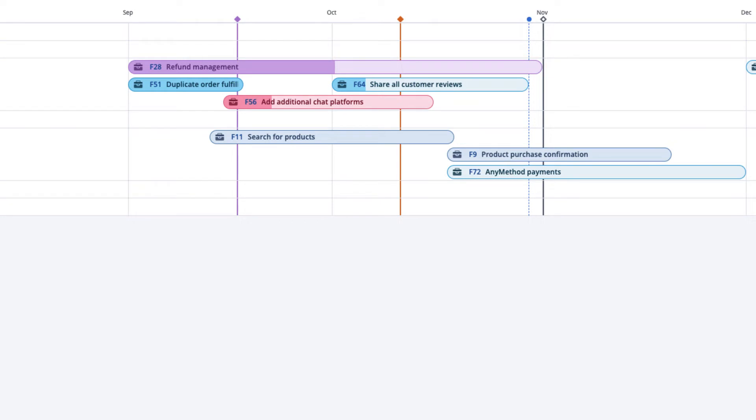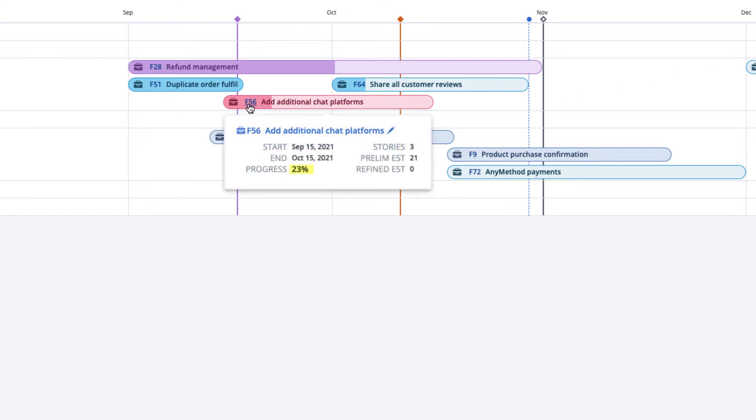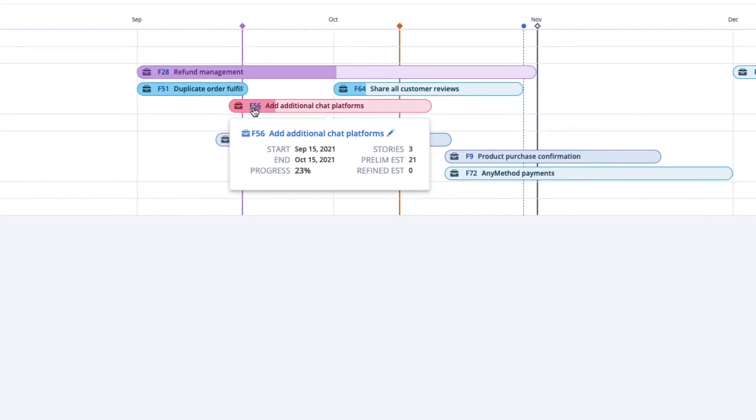As previously mentioned, if you hover your mouse over the Portfolio Item to view the pop-up window, the progress value will tell you the percentage of story points accepted versus the total planned estimates for stories associated with the Portfolio Item.